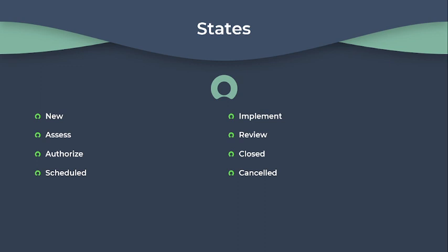It is evaluated by the leadership and all stakeholders who will be impacted by the change, and then it is given an approval. For high priority changes which might impact the overall business operations, the change advisory board is also consulted.